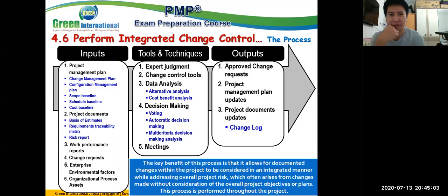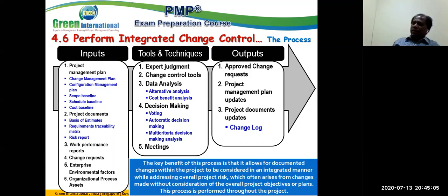Yeah, correct. For example, based on the strategy, we had some strategy of managing the schedule. Say, a simple example in a control exercise. Previously, during the planning we decided we need to measure the schedule performance every 1 month. So we did this measurement for the last 2 months. We identified a lot of variances. Oh, this is going to be a problem. So we have to change our control strategy. Let's go for measuring the progress weekly.